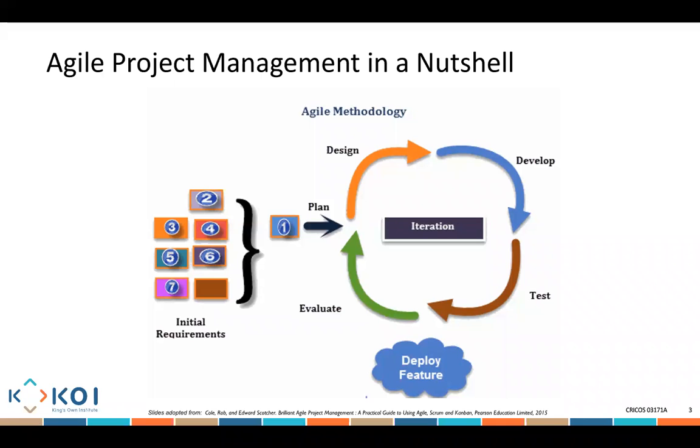So what happened? The Agile team will come, we'll look at all of these backlog. We'll say, all right, let's look at everything there. What do we want to go and deliver first? And then you say, okay, we want to deliver 1. That's fine. They might choose to deliver 7 first. They might choose to deliver 8 first. They might choose to deliver anything. So this 1, 2, 3, 4, that doesn't mean that's the order of how the work needs to be done. Because every one of these user story is a functionality. You might choose to deliver functionality number 7 before you deliver functionality number 1.